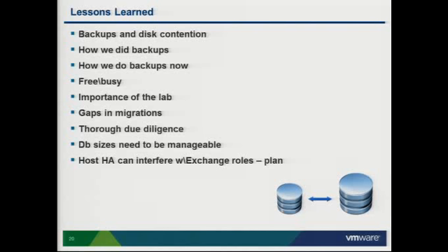But as you're migrating your users, migrate 1,000 people or migrate 2,000 people and wait. Let it sit, because stuff will pop up that you weren't expecting. And if you've migrated 1,000 people on Tuesday and then you migrate 1,000 people on Wednesday and 1,000 people on Thursday, you don't always see that stuff. And now you've got 3,000 people that could potentially be impacted on a new platform.